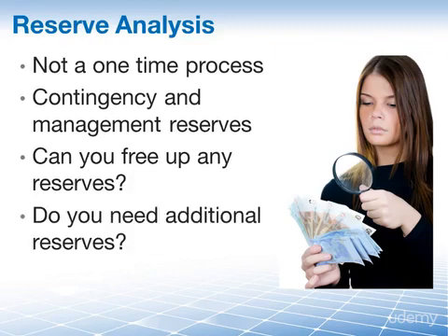Or, on the other hand, do we need more reserves? As the project is being executed, it is possible that risks have a greater financial impact than originally anticipated. Perhaps new risks have arisen or have been identified, which requires you to bolster your reserves.